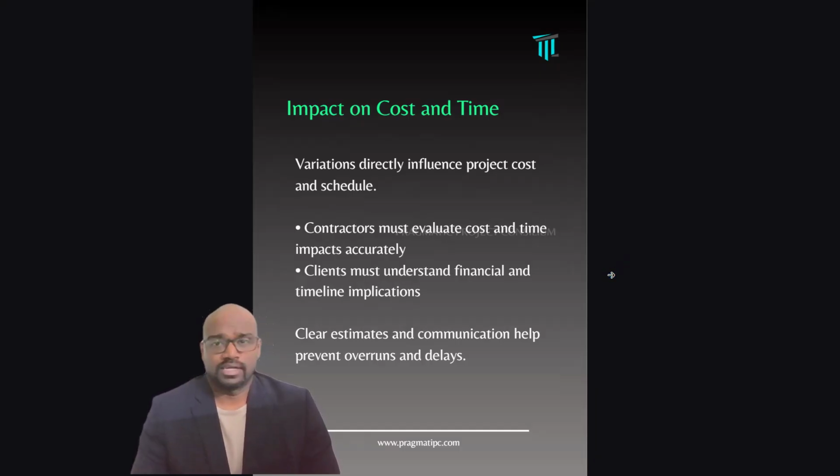And he literally says we have the right to ask for the breakups. So I said, what does the contract say? The contract says that the quotes have to be shared with transparency of what the markup is. The contract is very clear: 3 quotes have to be submitted, and you cannot immediately ask for further details. And this delay in the variation decision will affect the project, and that will be on the employer's accountability.